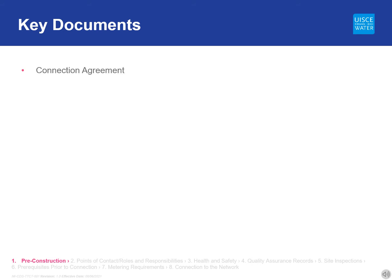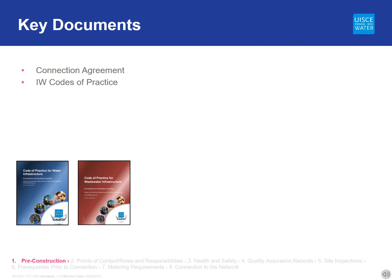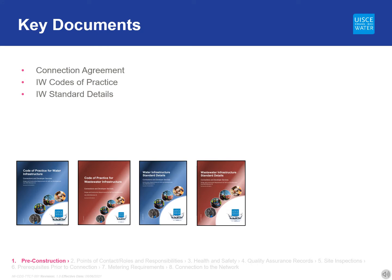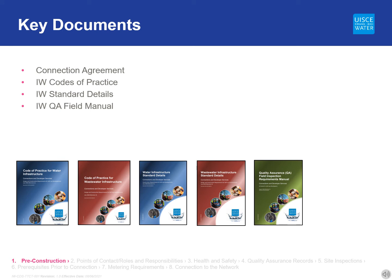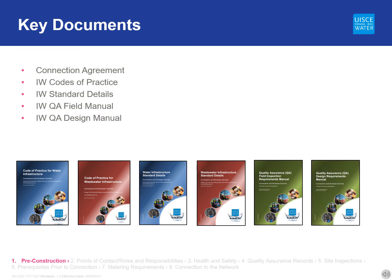The developer must be familiar with the contents of the connection agreement and must comply with its requirements. The Irish Water technical guidance documents are given to the developer on a USB stick when the connection agreement is issued. The documents are: Codes of Practice for Water and Wastewater, Standard Details for Water and Wastewater, Irish Water Quality Assurance Field Manual, and Irish Water Quality Assurance Design Manual. These documents are also available on the Irish Water website in the Technical Guidance section of the Developer Services web page. Irish Water recommends that all personnel involved with the development are familiar with the Codes of Practice and Standard Details documents.